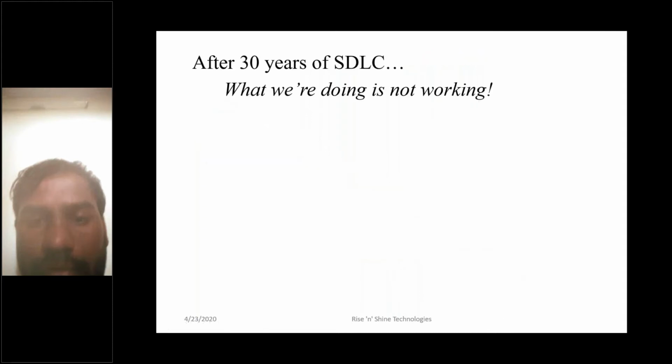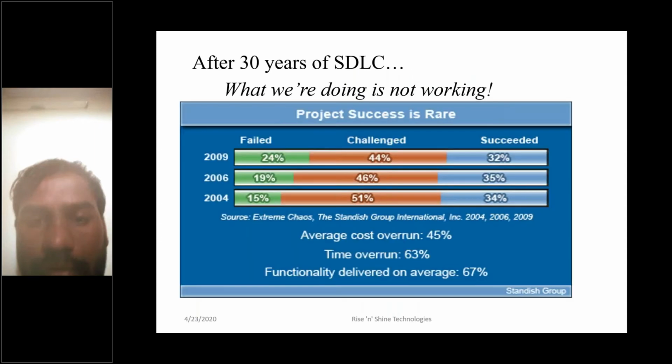But in the last 30 years of statistics, what we are doing is not working. If you observe statistics collected until 2009, almost 24% of the projects using this waterfall approach are getting failed, and 44% of the projects are challenged, in the sense that they planned it for 1 year, but it extended by 2 or 3 months, some duration.